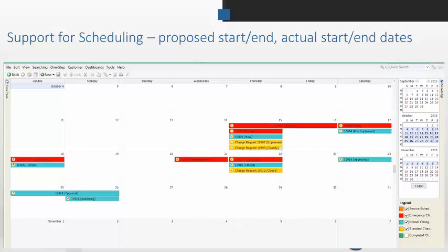Yeah, and I'll give you a perfect example of this. We have an organization where their customer service department was actually receiving updates about changes from their customers rather than from their IT department, because there were only certain methods of communication being used and that particular department didn't receive them. So the more ways that you can communicate within your organization, the more beneficial it is. That way, in this particular case, customer service wouldn't be hearing about a change from the customers. They would have heard it from IT and been prepared for those phone calls they received. Yeah, good point.